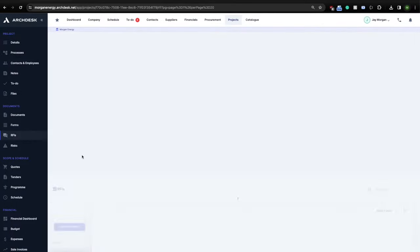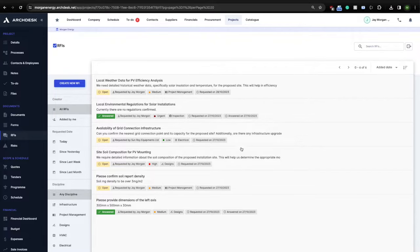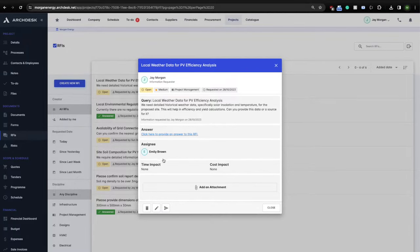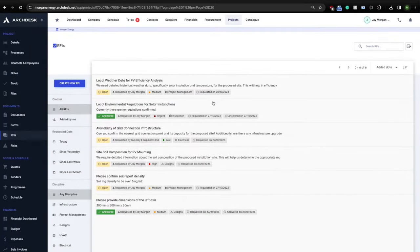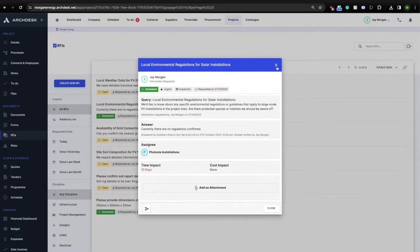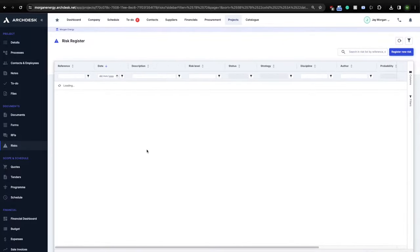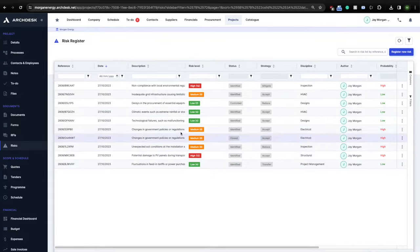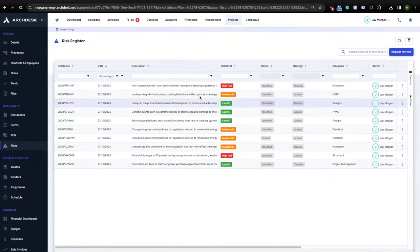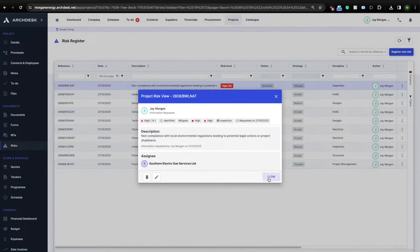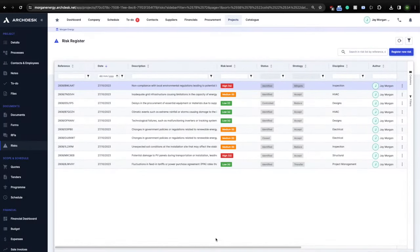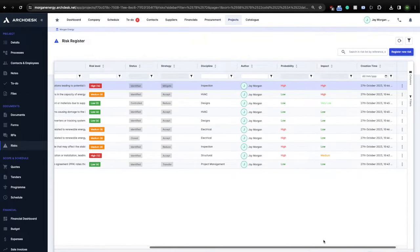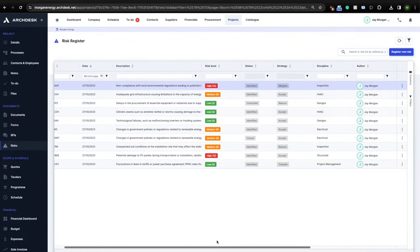Let's take a look at RFIs or Request for Information module. Here you can issue official queries internally or externally. RFIs can be distributed via email and answers are securely held in ArcDesk. Each project can optionally have a risk register. The risk register is a useful module for running your weekly project management meetings. Each risk is automatically calculated based on impact and probability and operates one of multiple strategies like mitigate, eliminate or simply accept.